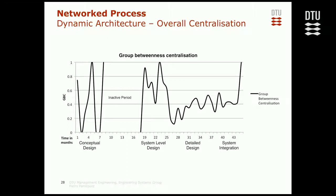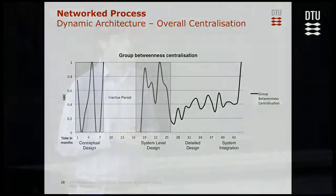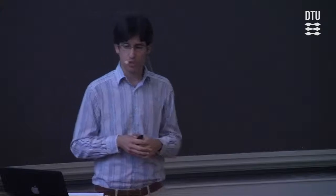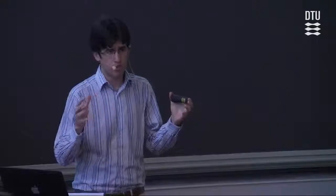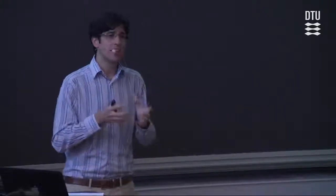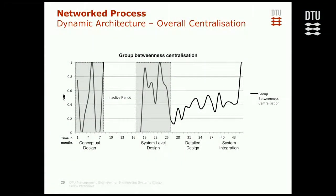Looking at the actual patterns, through the framework's methodological part I propose measuring this through group betweenness and centralization. In the stages of conceptual design and system-level design, we see higher levels of centralization, which sounds about right. Conceptual design in this particular case was a stage with not so many activities going on, so there is some variation, but overall it was high. Then when we move to detail design, there is a sharp decrease in overall information centralization — coinciding with what we expected.